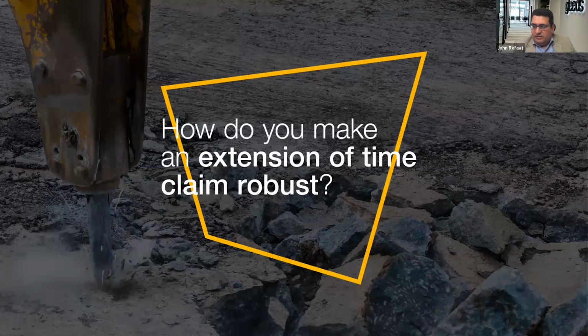Extension of time claims must establish the cause, effect, and entitlement for additional cost or schedule delays, along with the extent of the damages or disruptions. The most common reason why a contractor or a claimant is unable to obtain an extension of time or recover additional cost is that he has insufficient evidence in the form of records to support his claim.